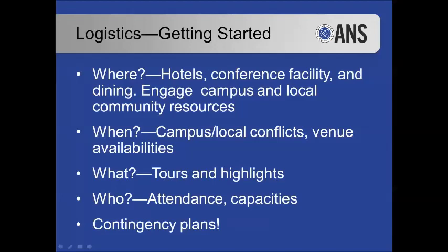Then once you start to know where these different options are, where you really want to have this thing, then you can start thinking about the when of the conference, partially because a big part of when you have the conference is when these different facilities are available. Some of you who've been following the student conferences for the last couple of years might know that we recently extended the process from turning your bid in 12 months before the conference to 18 months.